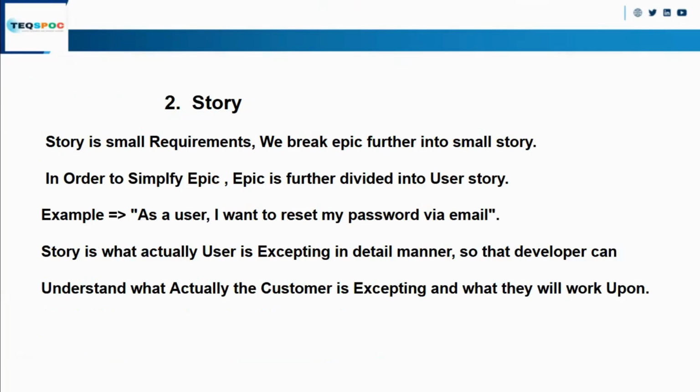So, as a user, I want to reset my password by email. As a user, I want to save my credentials so that I can log in to the website. So this is a user story. Now, further, the user story is divided into tasks, and further the tasks are divided into subtasks.